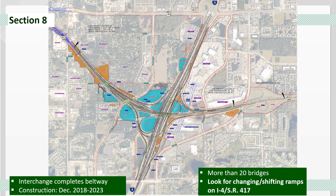Section 8 is a design-build project that includes the new Wekiva Parkway interchange at I-4 that will connect with State Road 417, then completing the beltway around Central Florida. This section started construction in December 2018, and it's scheduled to finish in 2023 with a financial incentive for the